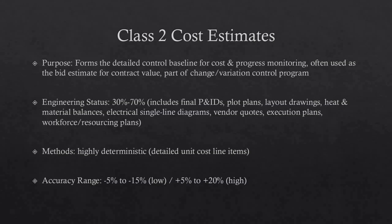Class 2 estimates are typically prepared as the detailed control baseline against which all actual costs and resources will be monitored for variations to the budget. They also form a key part of the change and variation control program. Class 2 estimates always involve a high degree of deterministic estimating methods and are prepared in great detail, often including tens of thousands of unit cost line items. Typical accuracy ranges are minus 5% to minus 15% on the low side and plus 5% to plus 20% on the high side. Ranges could exceed these values in unusual circumstances.